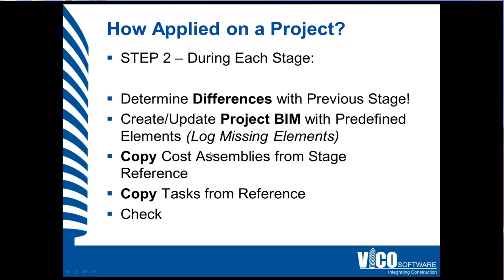Then you create or update your project's BIM with the predefined elements. And of course, you may find elements that are not included in the warehouse. Maybe there is a part of the design for which you did not predefine an element yet. Those elements need to be logged so that there is no surprise as soon as you get to the end of the stage and there's no cost and schedule information for those elements.